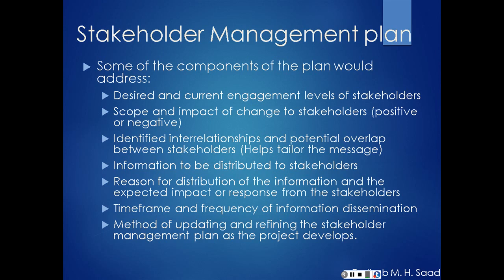Information to be distributed to stakeholders. If you have a stakeholder who has very limited interest in the project, you don't want to bombard them with detailed information about the project. On the other hand, the project owner, for example, or the project client or the project sponsor, they need to get all the details, so the level of communication and the message itself is going to be different.